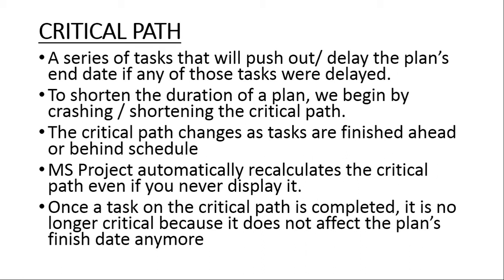So as you implement tasks, the critical path will also be changing, because when you finish a task, say ahead of time, or you finish a task late, you either delay the whole project or you create more time for the project. So if we finish one day early, it means that we have more time and we can start the next task earlier, thereby causing the finish date to also be one day earlier.